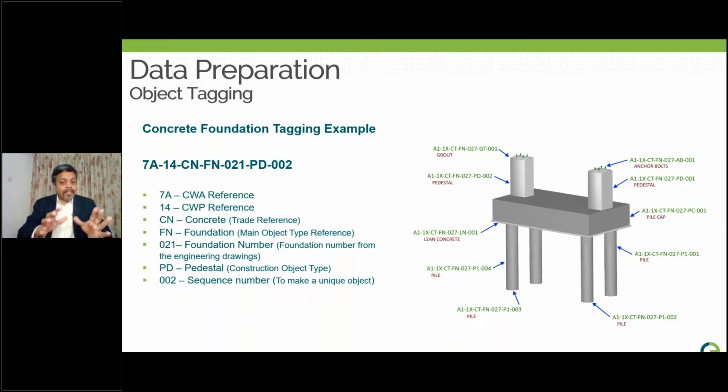Main object reference is there, so overall progress of the object could be measured at that level. The individual progress can be measured at the construction component or construction object level. There are many benefits based on your project scope. From the very early stage, we could advise an intelligent tagging procedure and strategy that suit any project.